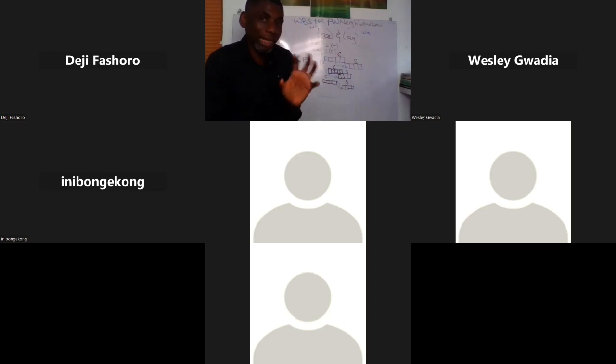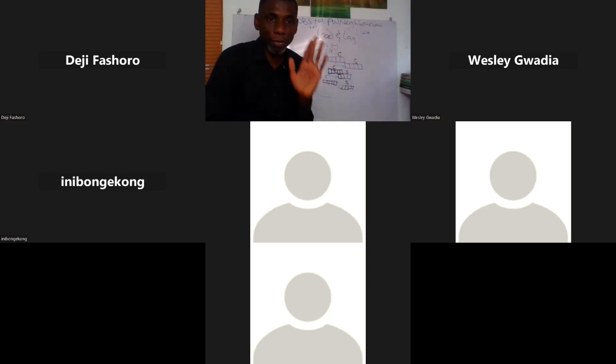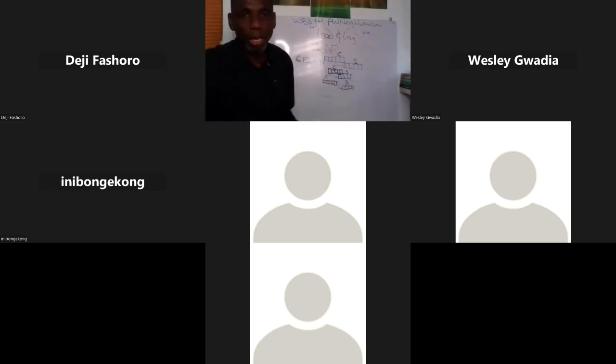But if you have some experience like Mr. Wesley has said, and I've also had, you may want to say, these 2 days, I better keep these 2 days and get my test before proceeding. Otherwise you have wasted money: you have started the substructure, they've laid block, only for the test to come and it has failed. You will remove the block and remove the concrete. It's a waste of money. So this helps you to plan your project.